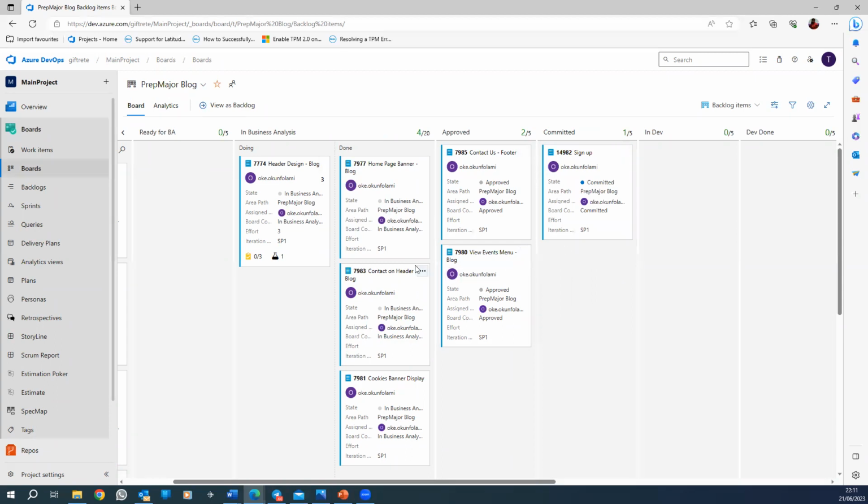So the BAs, we have to be very proactive because we work ahead of the sprint. I'm sure it was mentioned to you: we work ahead of the sprint. What does that mean? BAs will already be meeting with the product owner before the project is even starting fully, because when the project starts, you want to have work ready for developers and testers. You can't wait until everybody is joining the team. This week you're supposed to already have started having those discussions with your other BAs: let's arrange a meeting with our product owner.